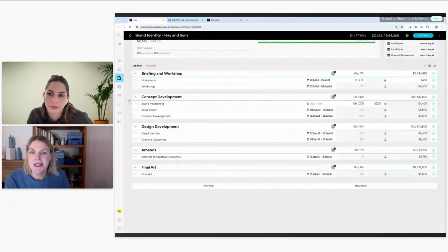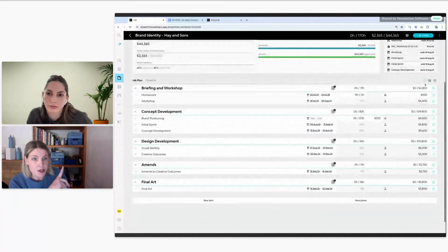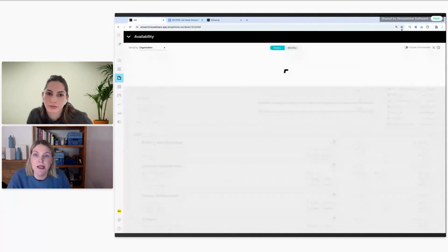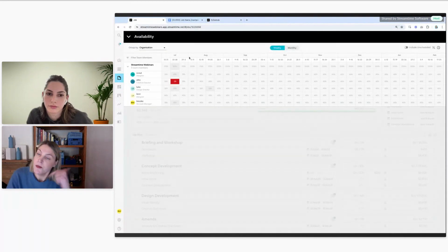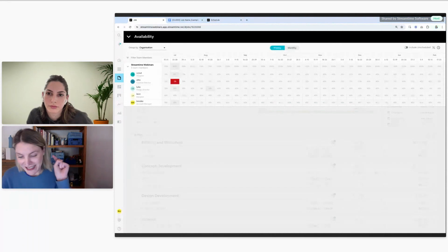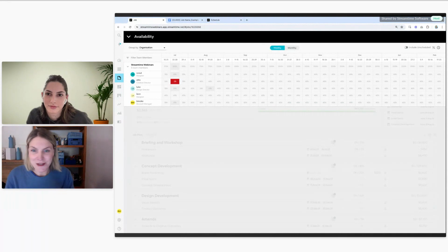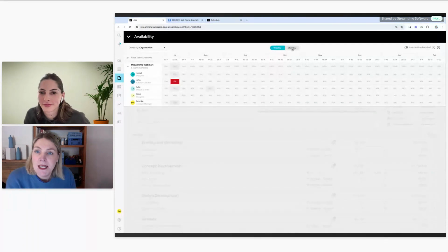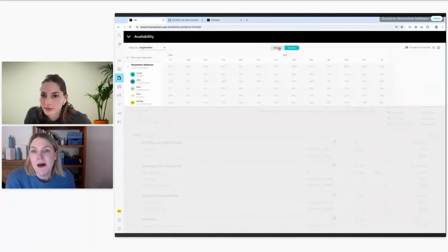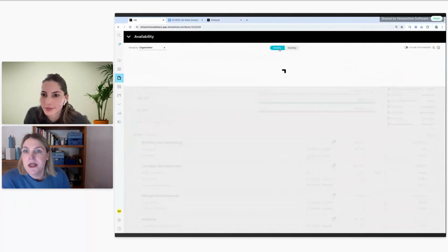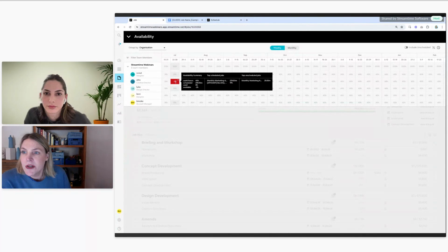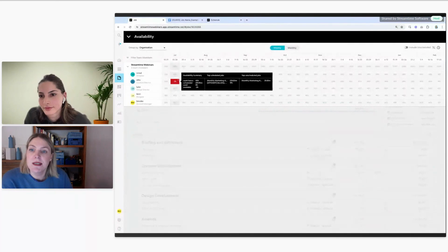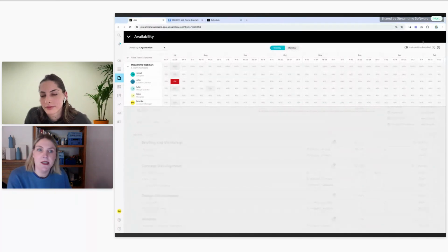But it means that I know when these hours that I've planned are expected to be in the studio and when my team's going to be working on them. Because what's really important to me is to understand how this new job that we've just had signed affects the capacity of my team. So I'm going to jump through and schedule it. But before I do that, I just want to show you guys the availability modal. So you can pull this down from anywhere in Streamtime by typing G and then A. No enter, no shift, no anything, just G followed by A, and it will bring down this. So this shows me by week or by month how available my team is based on what I've already got scheduled. So you can see that Otto is looking to have a bit of a squeezy week next week. He's already overbooked. He's looking to work an extra 2 hours. So I want to address that when I get to the schedule.